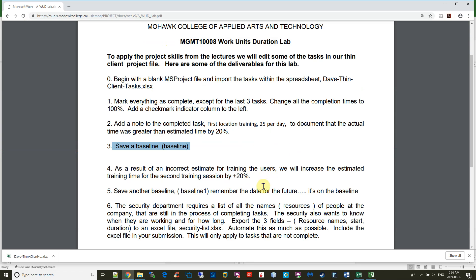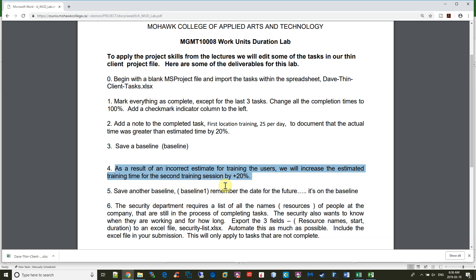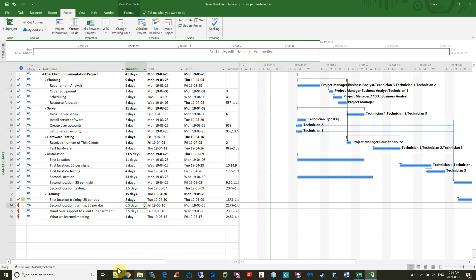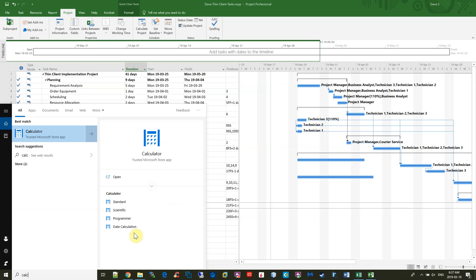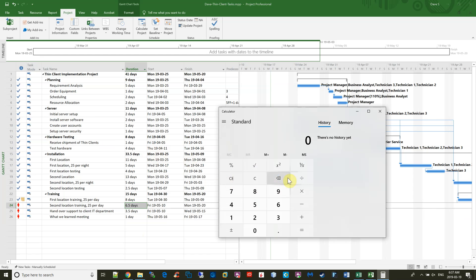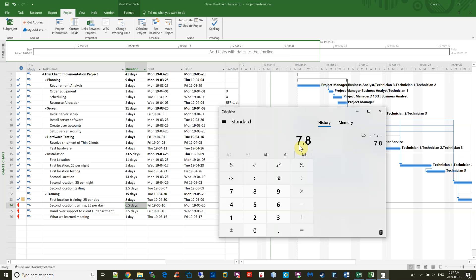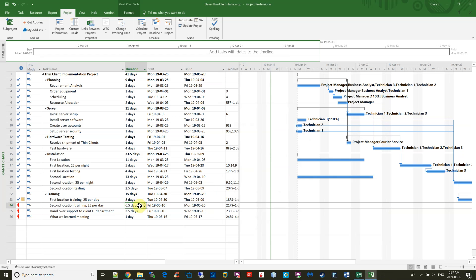The fourth step here is, as a result of the incorrect estimate for training the users, we will increase the estimated training time for the second training session by 20%. So you can see that we have 6.5 days suggested for the duration for the second training, so we're going to increase that by 20%. So we'll call up the calculator, and we'll type in 6.5, and to increase it by 20%, that would be 1.2, so we should allow 7.8 days. So we'll change this to 7.8.